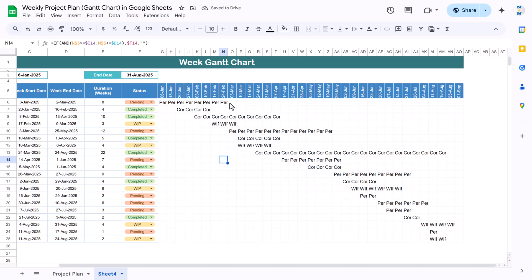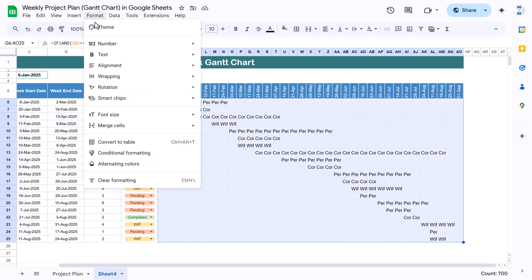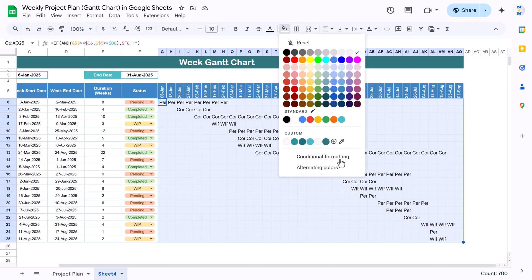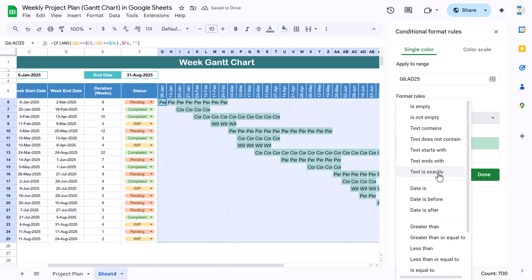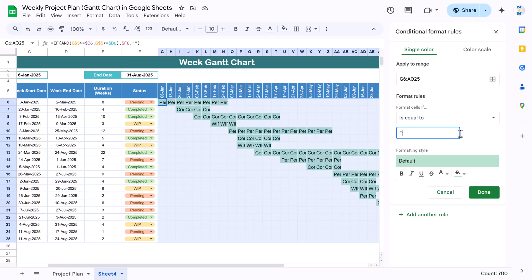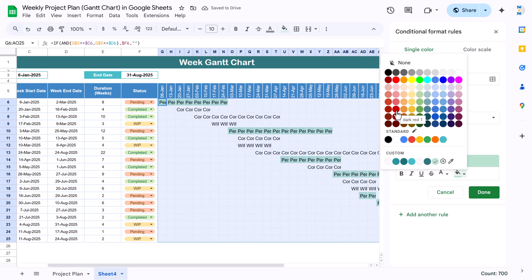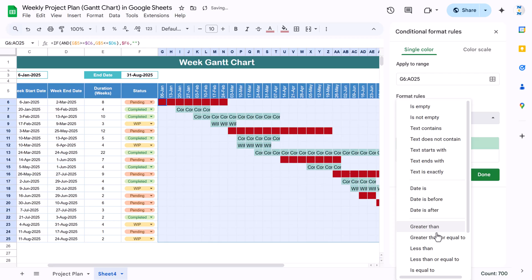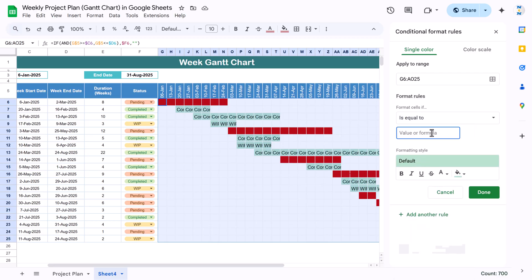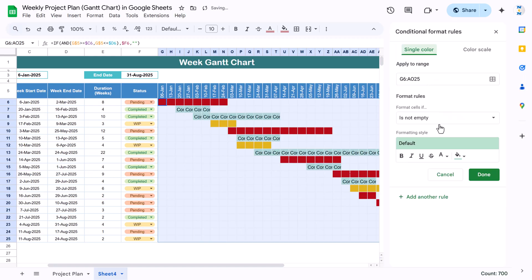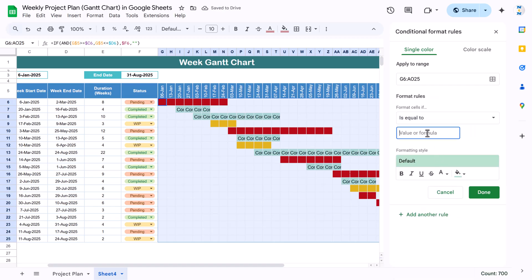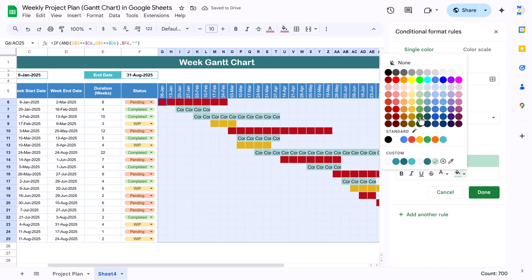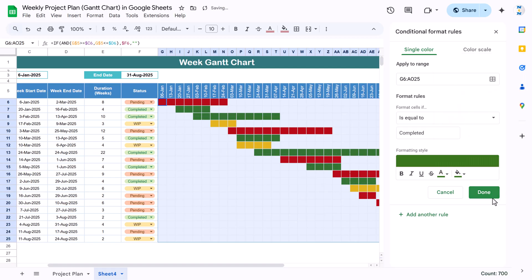We can see it's showing Pending and Completed on the correct date ranges. Now select the timeline range and go to Format > Conditional Formatting. Add a rule: 'Is equal to' Pending — select red fill and matching font color. Add another rule: 'Is equal to' WIP — select yellow fill with same font color. Add another rule: 'Is equal to' Completed — select green fill with matching font color. Click Done and close.